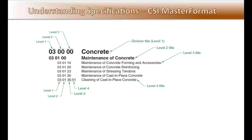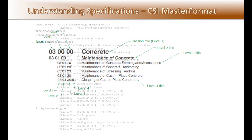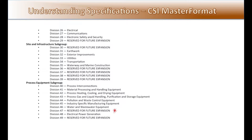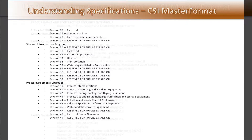The first two numbers represent the top level in the system and identify divisions. The remaining numbers represent additional levels of detail and are used for identifying related areas of information within the division. There are 50 major divisions in all. Note that not all of the division numbers are used — some divisions are being reserved for future expansion.